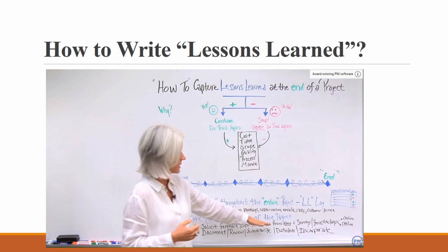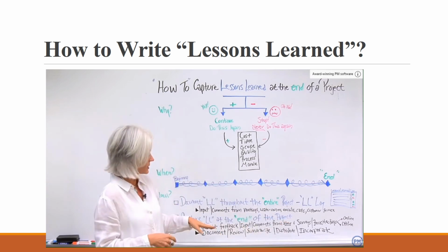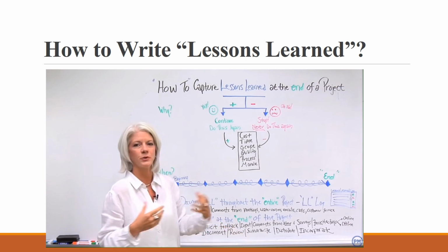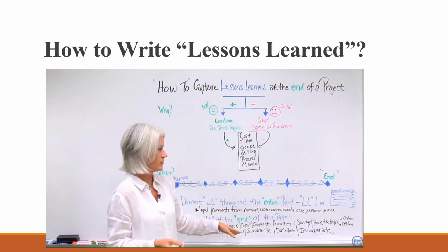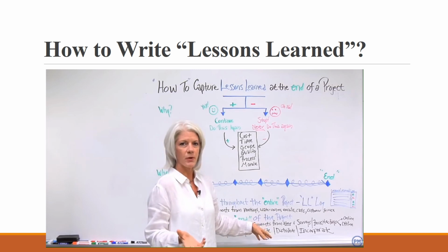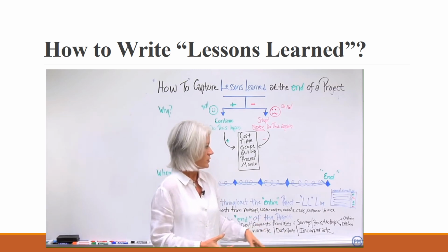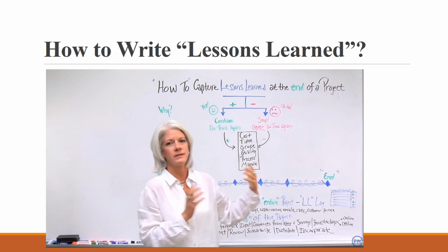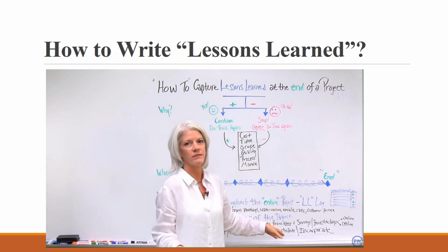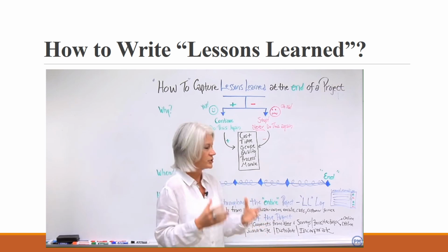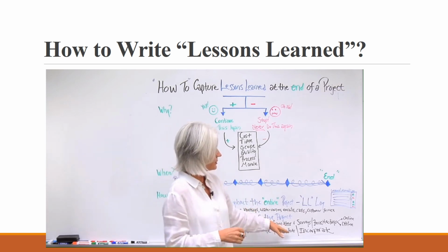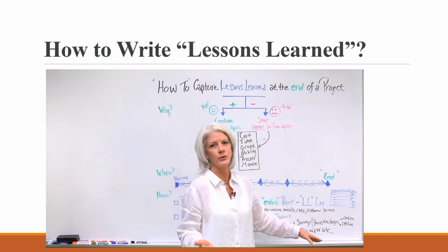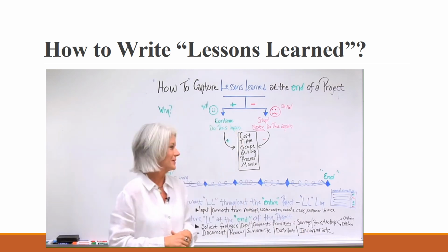And then once that's done, once you go back and solicit additional information for lessons learned, you want to document it and review it. You as a project manager, review it, make sure everything's documented properly. And then maybe you want to summarize the lessons and say, here are the lessons learned. These are the ones that we found helpful. We're going to take them forward and do them again. These are the ones that we found had a negative impact. We're going to be sure to stop and change, and here's how we're going to change it. And you distribute that to the appropriate team members or your stakeholders. And again, be sure to incorporate those lessons all along the way.